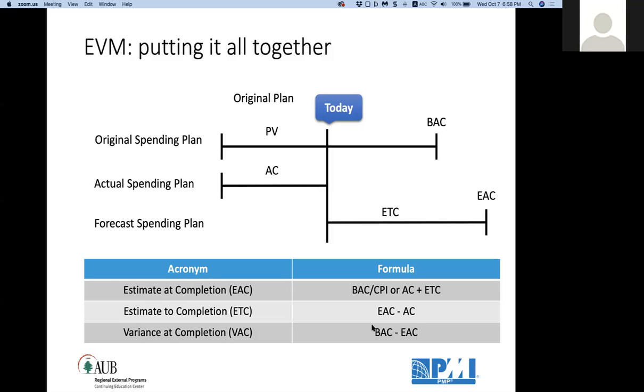يس مين عنده سؤال؟ ببداية البروجكت ممكن يكون الفارينس نيجاتيف، اوكي؟ بس بوصل لبعدين للاستيميشن الاي تي سي او هيدا الطويل، ممكن الفي اي سي يكون عندي بالبوزيتيف، اوكي؟ which is good، يعني بهون كنت صلحت انا غلطي او صلحت الطريق اللي عامله، اوكي؟ سو الفي اي سي طالما هو بوزيتيف بيدل انه الفارينس رجع مشي حاله. يس او شوي نيجاتيف لانه احنا فينا نطلع عن البادجت up to 10% up to 20%. I'm okay, I'm fine with this.